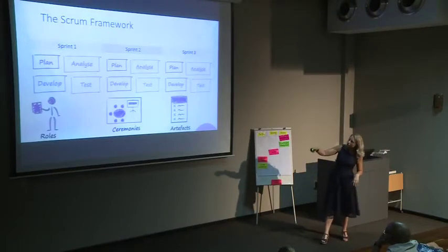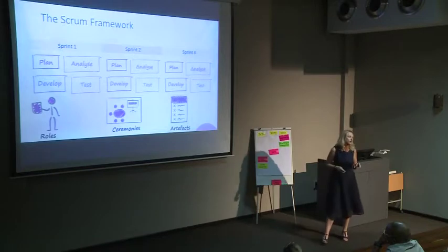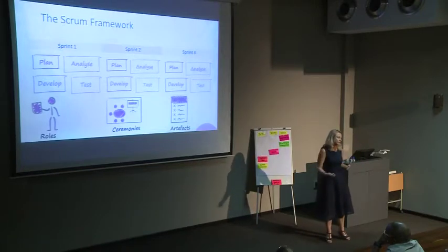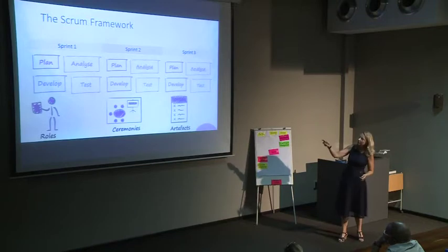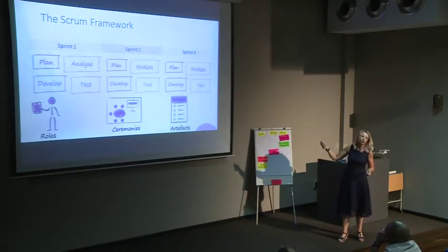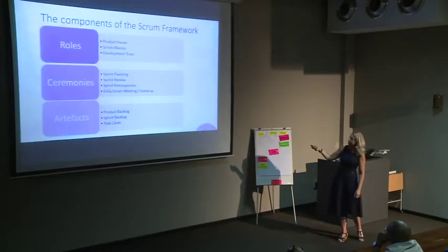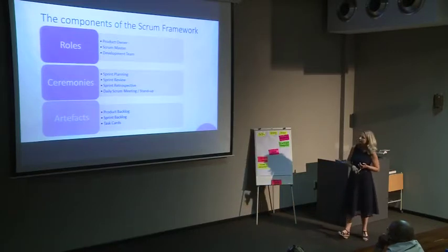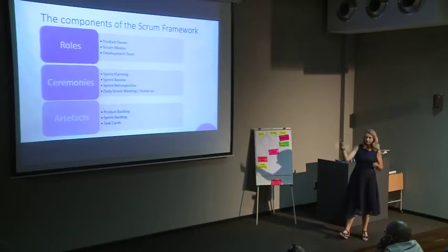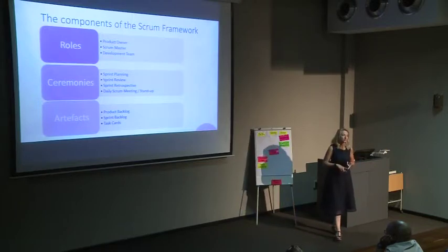The Scrum framework has your two-week sprint at the center. In every sprint there's planning, analyzing, developing, and testing — it's not upfront scoping and documentation before you start. You've got specific roles: product owner, Scrum Master, and development team. Specific ceremonies or meetings: sprint planning, sprint review, sprint retrospective, and the daily Scrum or stand-up. And artifacts: product backlog, sprint backlog, and task cards.